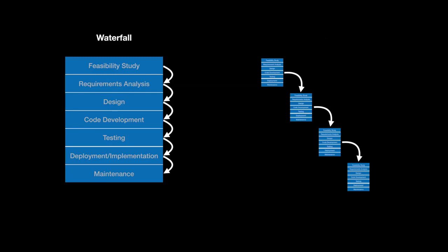And this is the idea of Agile. Agile still uses the software development lifecycle, but it's quicker with it. Agile does short, iterative, repeated loops of the entire cycle, with lightweight versions of the deliverables. Agile also encourages the people who specialize in each stage to work across multiple stages of the lifecycle, and moves backwards and forwards up and down the cycle stages whenever new information becomes available.